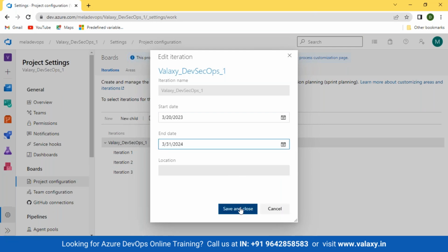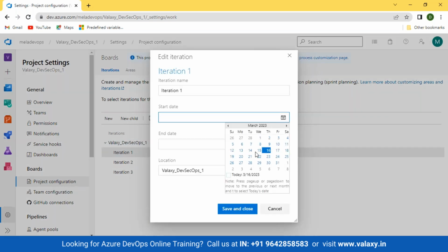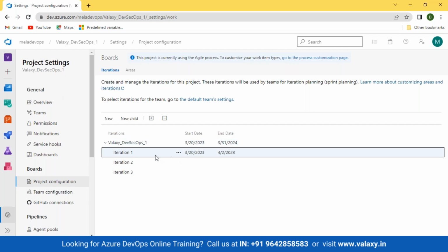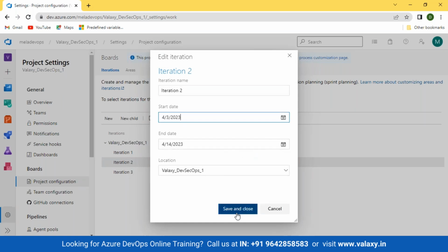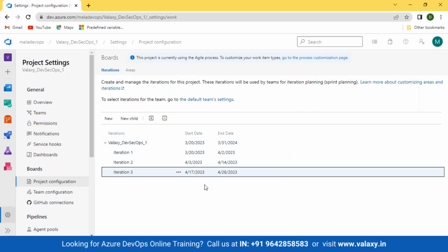It's a big project. It's agile. That's why we are using agile. It's a big project, correct? So you have selected a start date and end date, and you have decided that you need 2 weeks of iteration. So this is where you will set the iteration date. Your project starts on 20th, your iteration of 2 weeks will get over on 2nd. So you have selected that iteration 1 will be of 2 weeks. Secondly, for your second iteration, automatically the start date and end date will be selected. You can also have your third iteration. This way you can keep increasing your iterations.